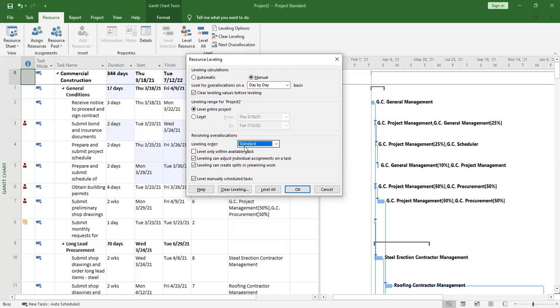For example, if a task has 5 days as the duration, and I'm supposed to start it on Monday, then by Friday I have to be done with it. You may find that even if I start it on Wednesday, I'm able to finish it on Friday. That means those first 2 days are the slack. So even if I delay that task by 2 days, the entire project will not be affected.